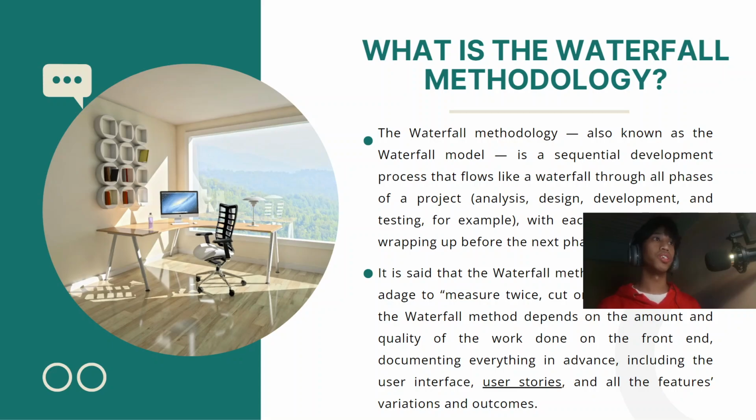The success of the waterfall method depends on the amount and quality of the work done at the front end, documenting everything in advance, including the user interface, user stories, and all the features, variations, and outcomes.